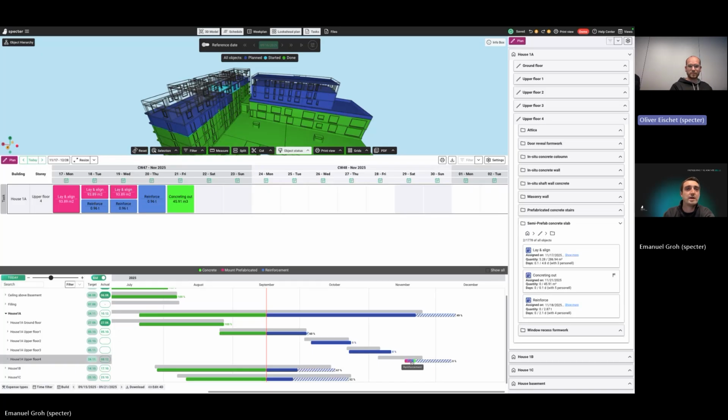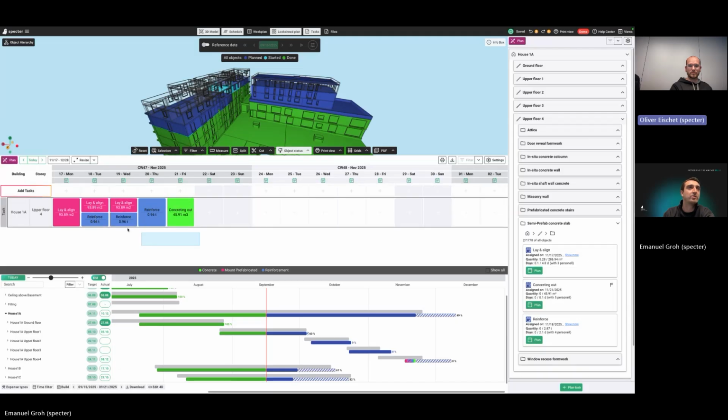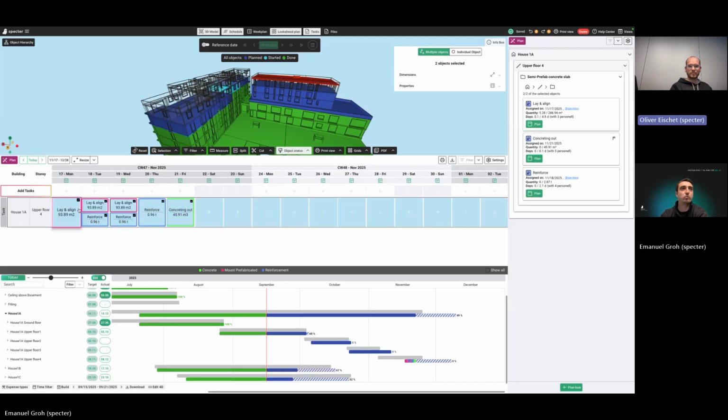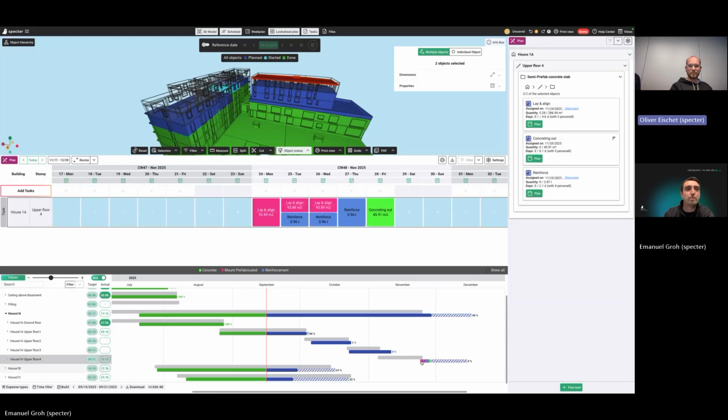And you can see if I now start to move my plan around, let's say we want to move things by a week, just pushing it over one week. Watch how my plan directly reflects back to my schedule. So, right, if we move those tasks one week back, likely we're overall going to be one week later. And also our predicted final end date, which is predicted by Spectre for you, will obviously be later, right?